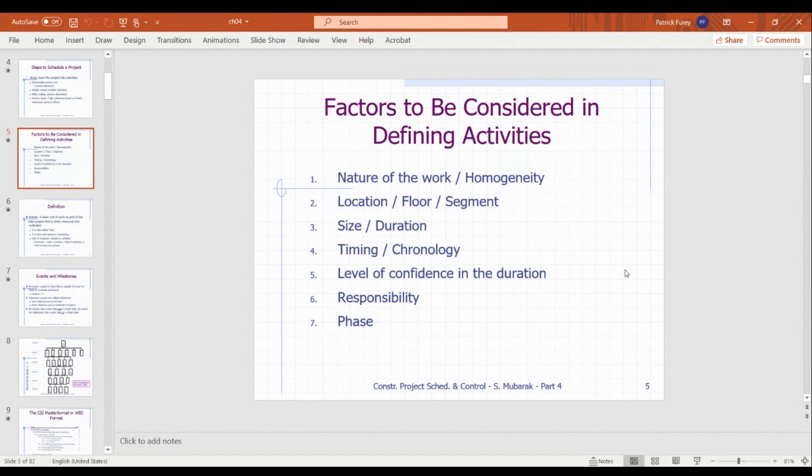You're not able to see through walls, and when they start stripping the walls is when you find out, oh well, they had cut off this header and re-supported it, holding it up from the ceiling above instead of the deck below. So that's just another thing. If it's a critical path item, especially, you'd almost try to remove something with a very risky duration, try to keep that out of the critical path, because now your critical path has at least one wild card. You throw 2 or more wild cards in there and you have very little chance of being accurate on your critical path duration.